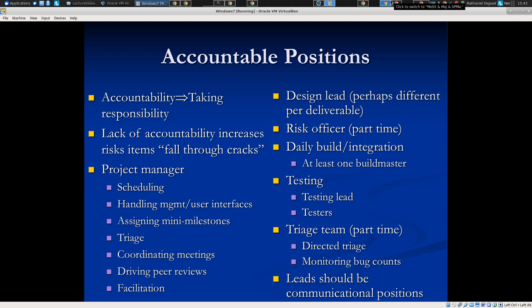Same thing with cost. Unrealistic expectations and ideas from managers. You know, if I give you more people, you can finish sooner. And it's just like bricklaying, right? I give you 100 bricklayers, you can do it 100 times as fast as one bricklayer. What's the matter with you technical folks? I gave you all the resources, it's on your shoulders to have it succeed. Horrible, it happens.